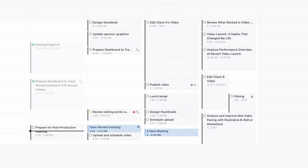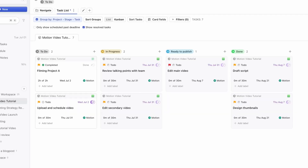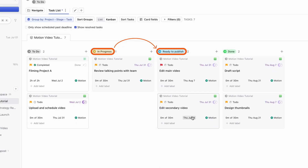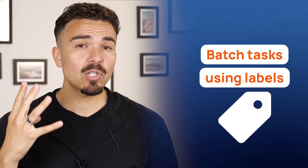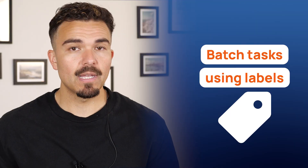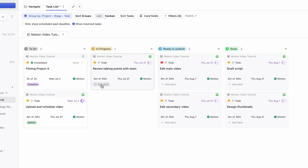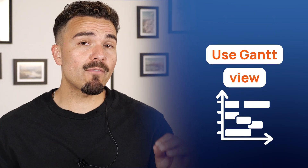Third, use the Kanban board for live updates — drag Video Edit from In Progress to Ready to Publish and everyone's instantly aligned. Fourth, batch similar tasks using labels, like grouping admin or creative work, and Motion will try to keep them together for better flow. And finally, use Gantt View every Monday to spot bottlenecks before they start — you'll avoid overload and catch issues early.